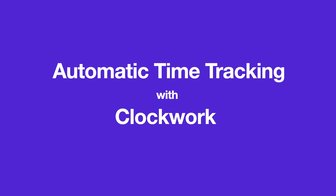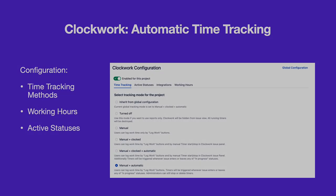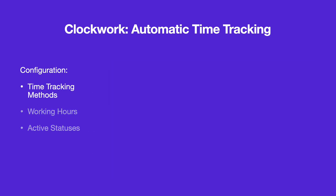Clockwork allows you to put time tracking on autopilot and capture work logs without any effort from the user. Automatic timers use the assignee's configured working hours and the issue status to calculate the time worked and create the work logs. To use automatic time tracking, you need to configure the time tracking method, working hours, and active statuses.